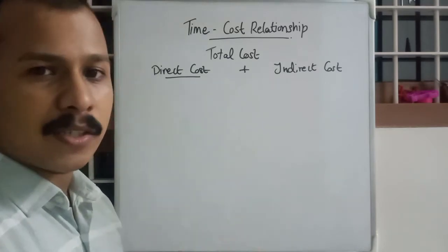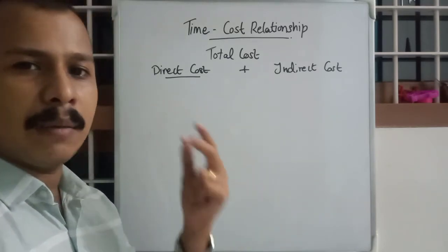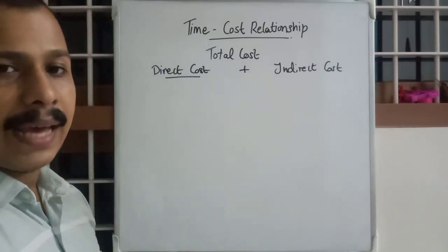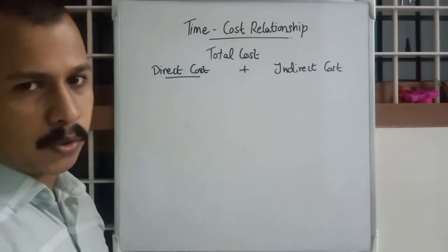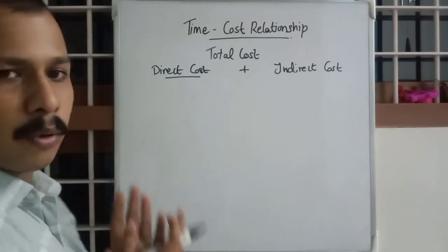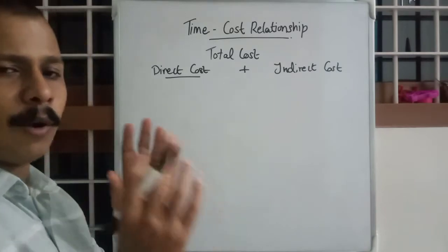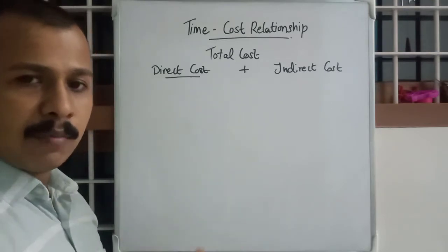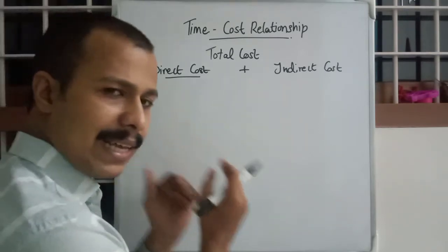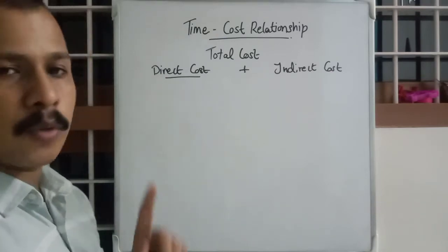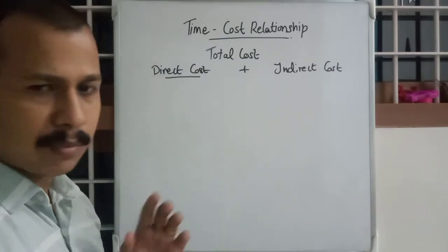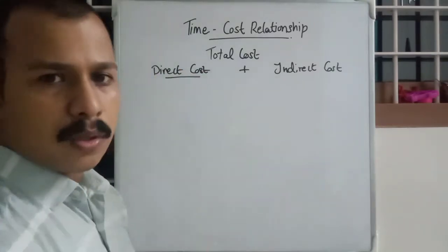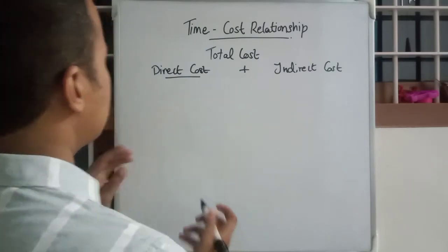The raw materials, cost of concrete, steel reinforcement, bricks, M sand, etc. will be coming under direct cost. And the cost of machines also, whatever machines that we are directly employing in the building construction. Okay, so whatever cost that will occur in the project, whatever things will be included in the project at the end, all those things will be coming under direct cost. As simple as that. Okay, so obviously everything that does not come under direct cost will be coming under indirect cost.